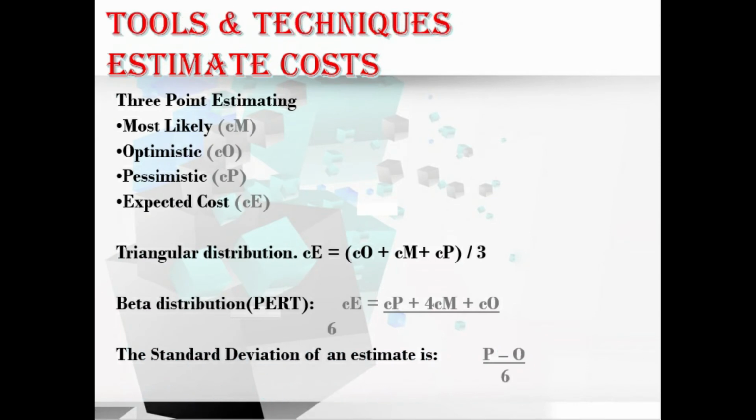Referring to the slide, the accuracy of single-point cost estimates may be improved by considering estimation uncertainty and risk, using three estimates: most likely, optimistic, and pessimistic. Most likely is the cost of the activity based on a realistic effort assessment for the required work and on predicted expenses. Optimistic is the cost based on analysis of the best-case scenario for the activity. Pessimistic is the cost based on analysis of the worst-case scenario for the activity.